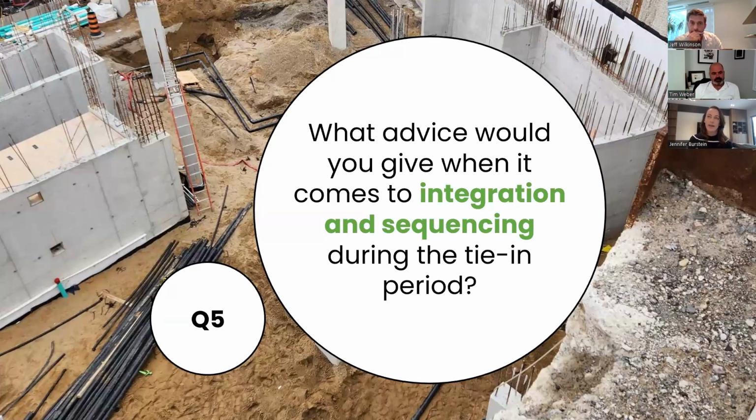Yeah, and we've had some lessons learned with this. You can speak to this as well, but at one point we had a spill out from a footing pour, let's say, and it damaged the horizontal tie-ins. So once you're completed with those horizontals, you're adding your layer of gravel for protection on top of that pipe. Those are the small minutia-type details that need to be taken care of to ensure that there isn't damage of that system. Jeff, anything to add to that?